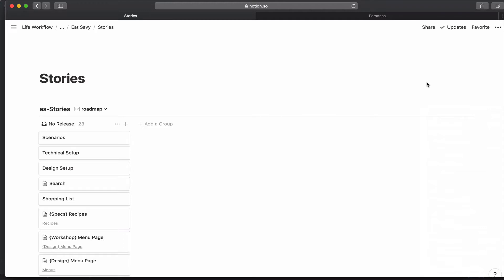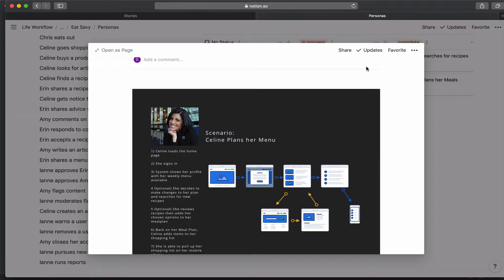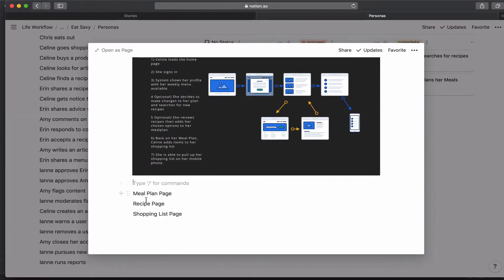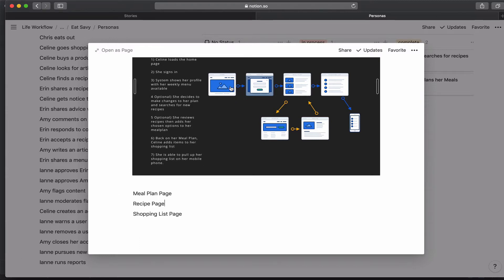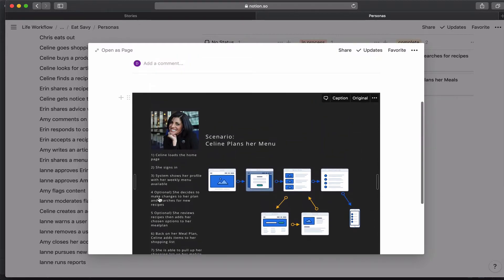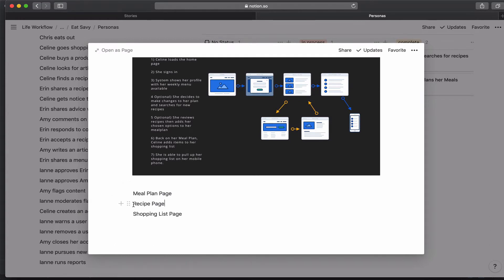When I talk about themes, I may not have everything in my theme happen. So if we get back to this theme, we've got the meal plan, the recipe page, the shopping list. For this site to go public and create an MVP, I have to have this recipe page. But I don't have to have the menu and the list page until maybe the first iteration. So I can have this out in the world with a homepage and some search functionality — that might be the MVP, just those three things. My scenario is not going to be tracked in the roadmap, just the epic level.